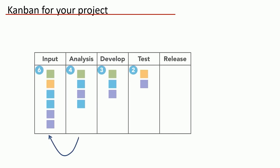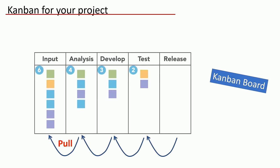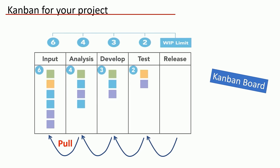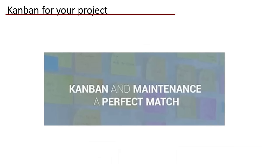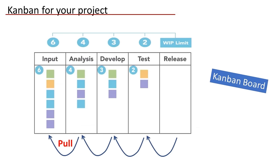The backlog can always be prioritized or reprioritized. On the Kanban board, in each area such as input, analysis, development, etc., you pull only the limited number of tickets from the previous bucket and work on them — only what you can handle based on team capacity. The numbers on top show your team capacity in each bucket. It's clearly a pull system. Kanban is a great fit for maintenance or service-type projects, since the team pulls the number of tickets they can handle and every group pulls from the previous bucket.